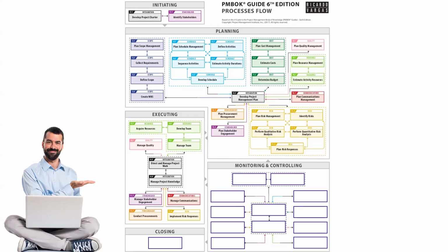You remember about the resources, we developed a resource management plan and we estimated the resources in planning. Now, according to those estimates, at the appropriate time, whenever those resources are required, we will acquire them. They may be human or other resources. We will acquire them just in time whenever required. It is not that we are going to acquire all the resources at once, but whenever some resources are required, they will be acquired throughout the life of the execution.